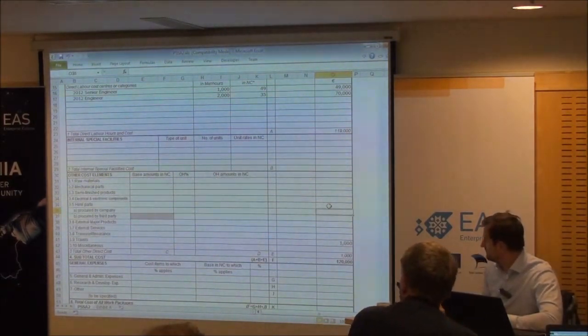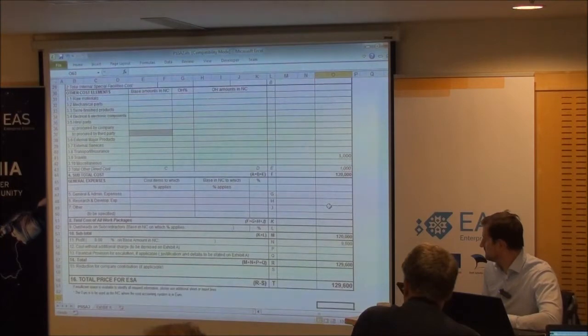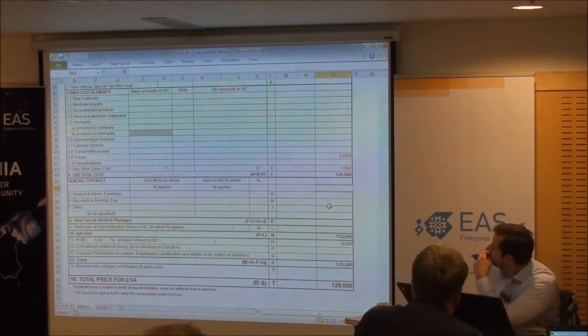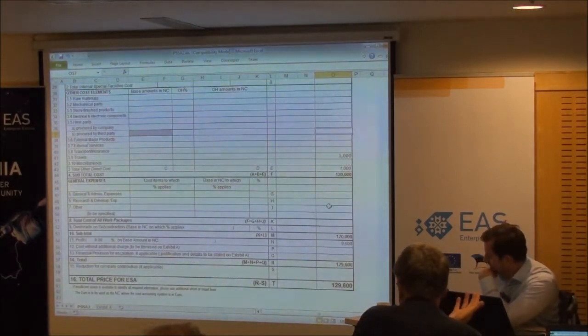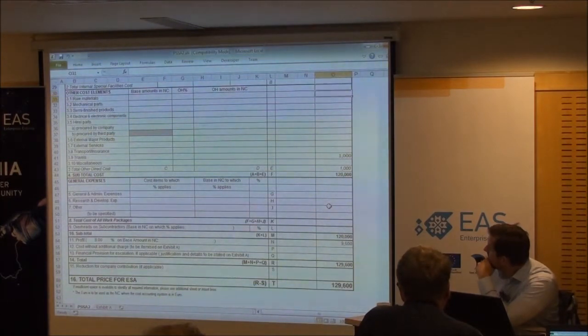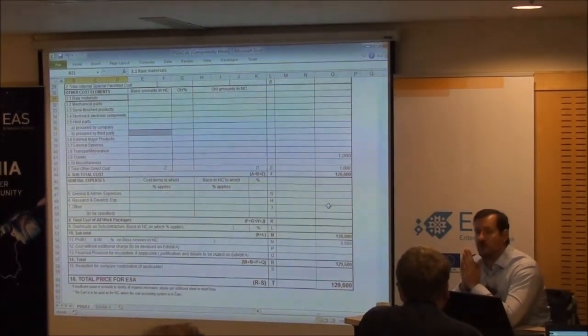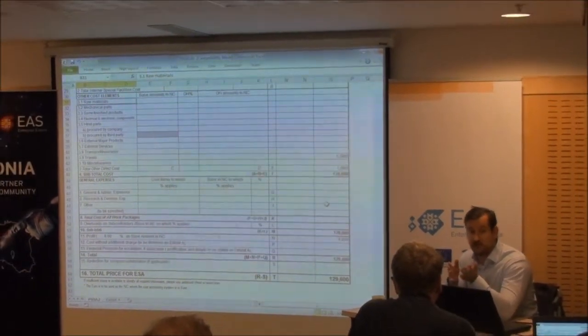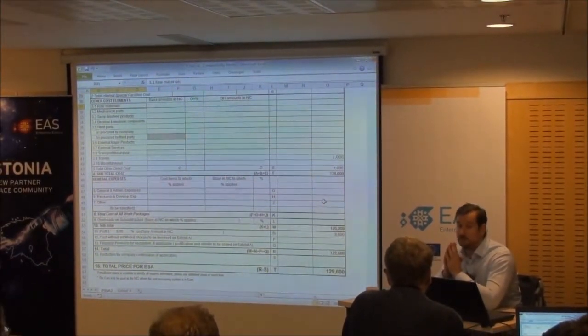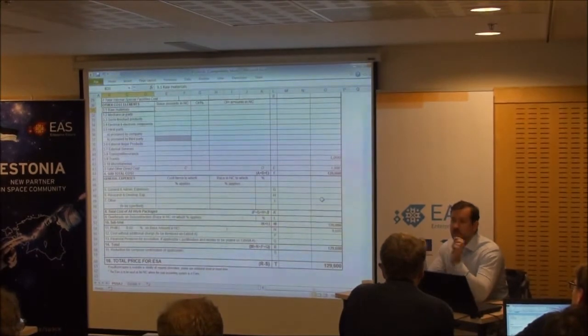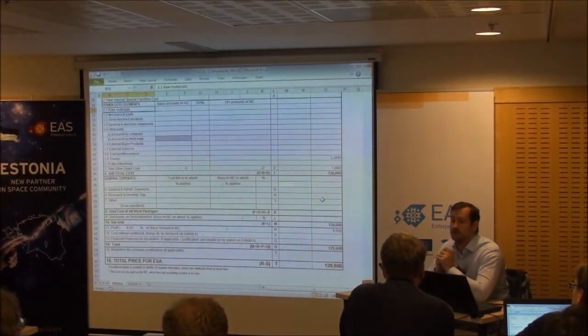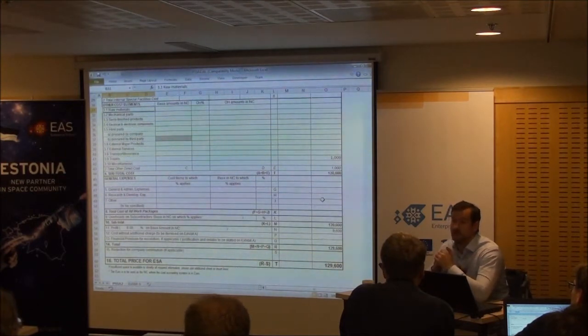I have a question about other cost elements. Are they with the VAT, value-added tax, or without? Well, typically in ESA you can't charge VAT. I don't know if there's a different condition in PECs, but in EMITS, no, they have a VAT-free situation. So you don't need to charge VAT, and you can't charge them. They're void of it.